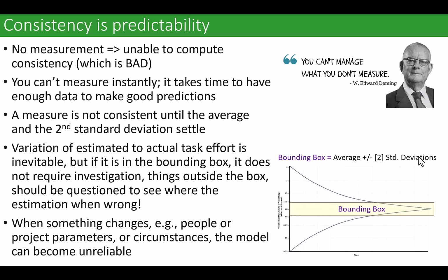And once you get into the magic place called the bounding box, where all of your estimates in the aggregate, not individual estimates, those are never ever going to be spot on except by accident. But if you were to say, okay, well, we have a 20-person team and each person can do 2 stories per interval, so we're going to have a data set of 40 things. If we were to come to the end of that interval and add up all the unders and overs, what we hope is that they will be zero, right? The deviations will be zero.